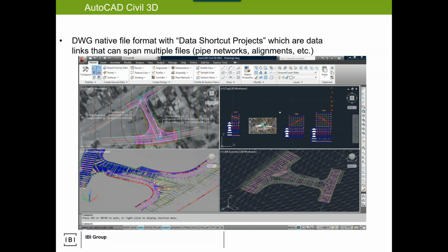At CH2M Hill, we were very rigorous on splitting by streams of data. So in the building, we would split by supply duct versus return duct. And this was all in the DGN world. A hospital could be split by a service stream: oxygen versus cleaning air versus water versus medicinal components versus chemical. Treatment plants, very similar. Site utility, very similar. When's the right way and how to do it?